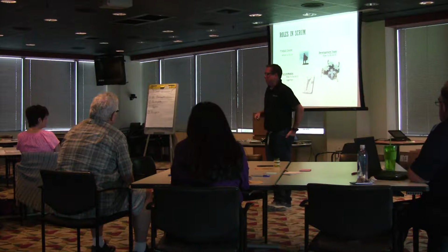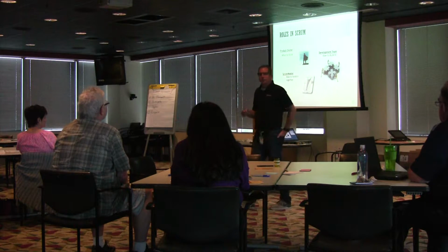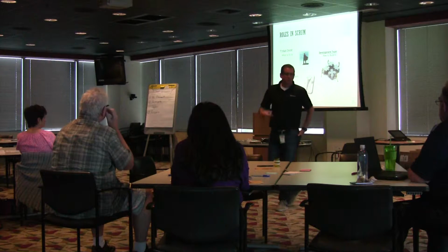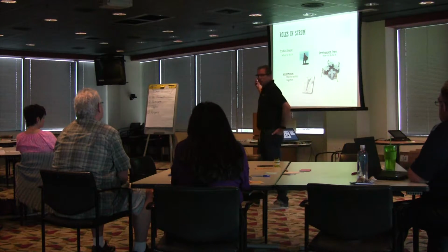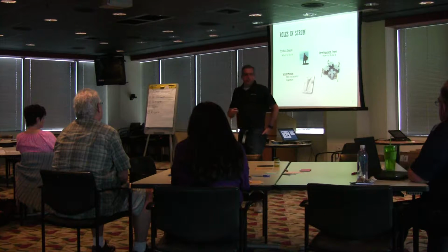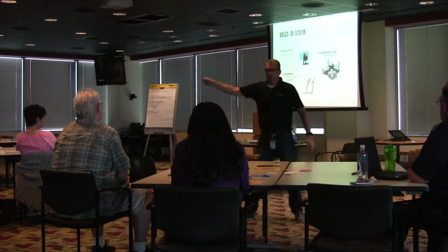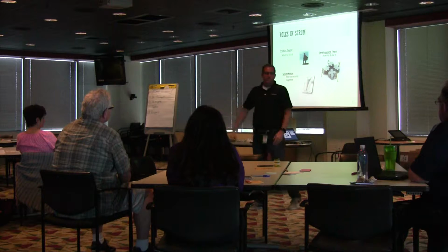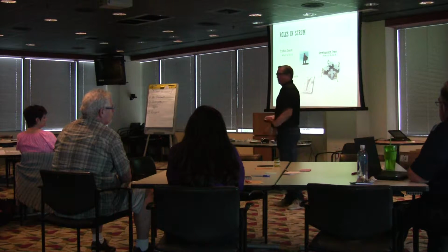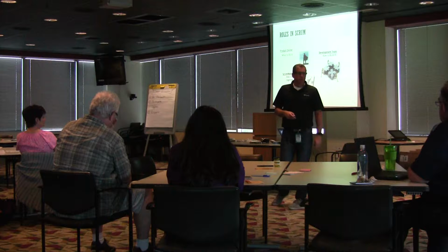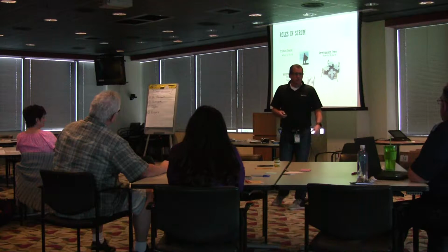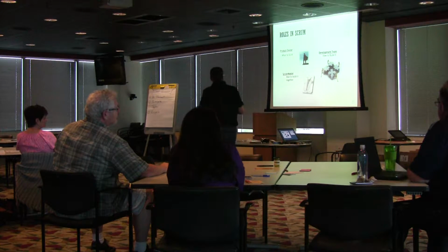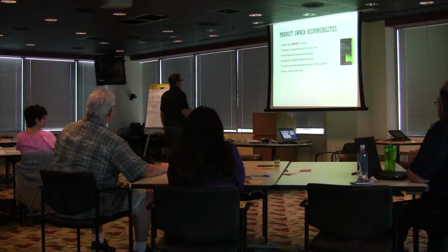Yeah, we did at my last company. We employed a very similar approach. Because at the end of the daily scrum, we said, hey guys, these two things came in. Let's talk about these real quick. And so we're constantly refining work so that we didn't have to spend 2 hours in a refinement session refining 20 things. We did 15 minutes here, 30 minutes here, 10 minutes here, et cetera. So we did it often as things came up. We called them story workshops. I don't know why they did, but they were very quick, succinct, move on. We called them that too. That's true.